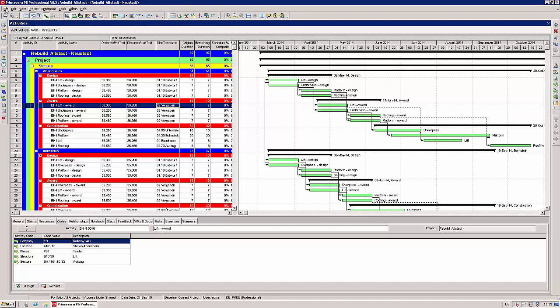The main difference between Tilos 9 Primavera Exchange regarding previous versions is there is no longer the need to access the Primavera data by a macro via the Primavera API. With Tilos 9, we directly use the native Primavera XML files. They are created with menu File Export and imported with menu File Import.